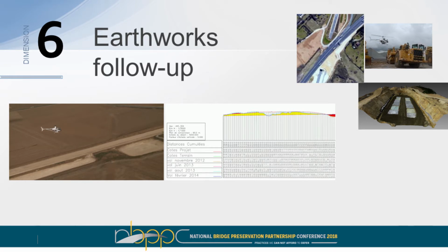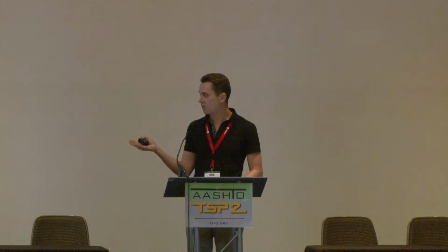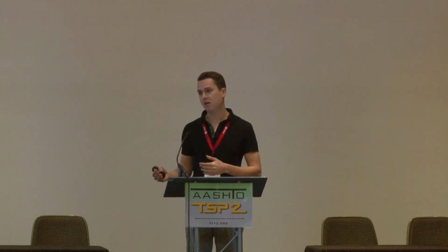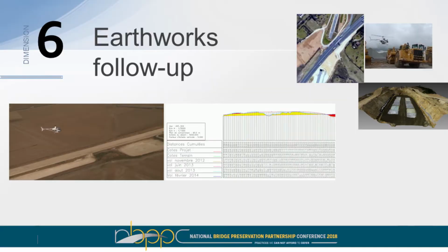So again, here's just an idea. If you run along the length of a construction route, you can get the profile of the earthwork that's been done, and then you can even update your plan based on the progress that's being made. So this is a more concrete way of getting a view of how your project is going rather than just kind of guesstimating your progress.